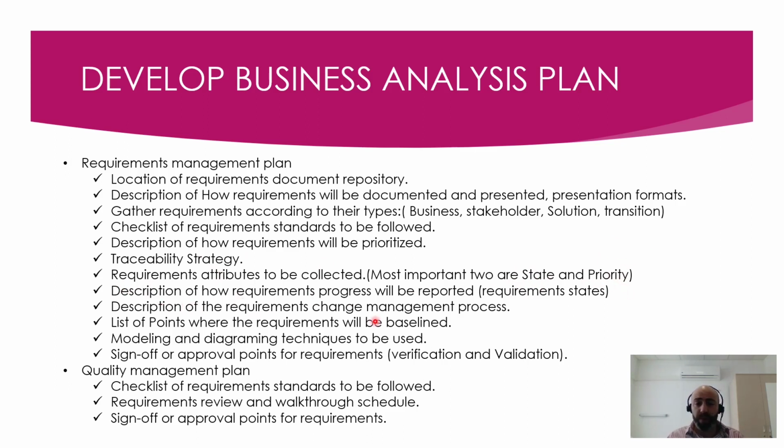Description of how requirements progress will be reported, requirement states, and a description of the requirements change management process. So the requirement states, as we said here, rejected, accepted, deferred. List of points where the requirements will be baselined, modeling and diagramming techniques to be used, sign-off and approval points for requirements.